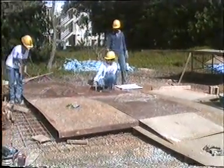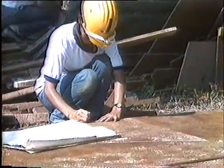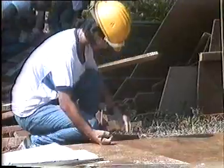In another corner of the site, the templates for the roof formwork are being fabricated. Because of the enormous size and irregular shape, each template has to be fabricated on the flat ground before it is hauled into place on top of each tie beam.